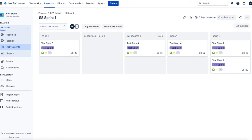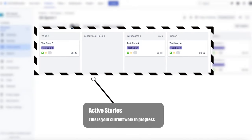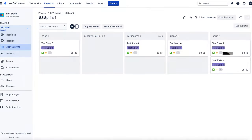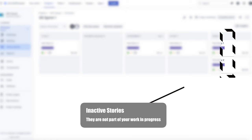The first thing you should do to start actively managing your process is to use an extremely important chart which you've probably never heard of before. I'd like to introduce you to an aging chart — or more precisely, an aging work in progress chart. So what is an aging chart and why is it important? Think back to the videos on cycle time and Monte Carlo. What they have in common is that they look at historical work — work that's finished. There's nothing you can do to improve their performance because they're done. You need to concentrate on your work in progress, your active work, specifically how old it is, and you need to do this every day. Your Scrum and Kanban board might look something like this. Until these stories are done, they're active and show your current work in progress. An aging chart will look almost exactly the same as your board but with a few additions.